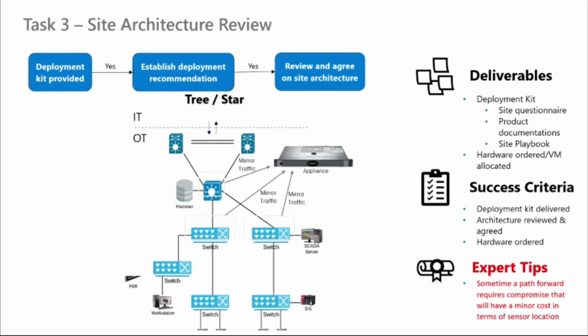If you see that taking these decisions will render your progress slow by a month or two because they have to order up equipment, and the compromise that you'll have to make is to place the sensor at a different location which will give you 80% coverage, then I think the answer is quite evident. Proceed with the 80% while mitigating other alternatives at this time. This flexibility is something that we encourage, and we saw its dramatic effect in different deployments. So open your mind in the architecture review, and make conscientious decisions based on the customer's current deployment and what we want to achieve.